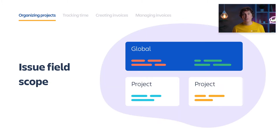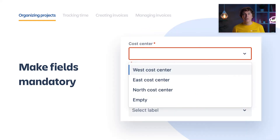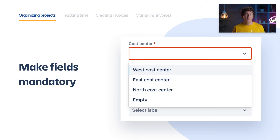Another important thing to keep in mind is the field scope. Some fields are visible inside specific Jira projects only, and some could be global for your entire site. I will show more examples soon. If your invoicing relies on some issue field, don't forget to make it mandatory. You don't want to lose money when someone forgets to set the task cost center. If you need to make a field not mandatory, make it mandatory anyway, and just create a separate option with a name like 'empty' or 'not set,' so people will not miss it.